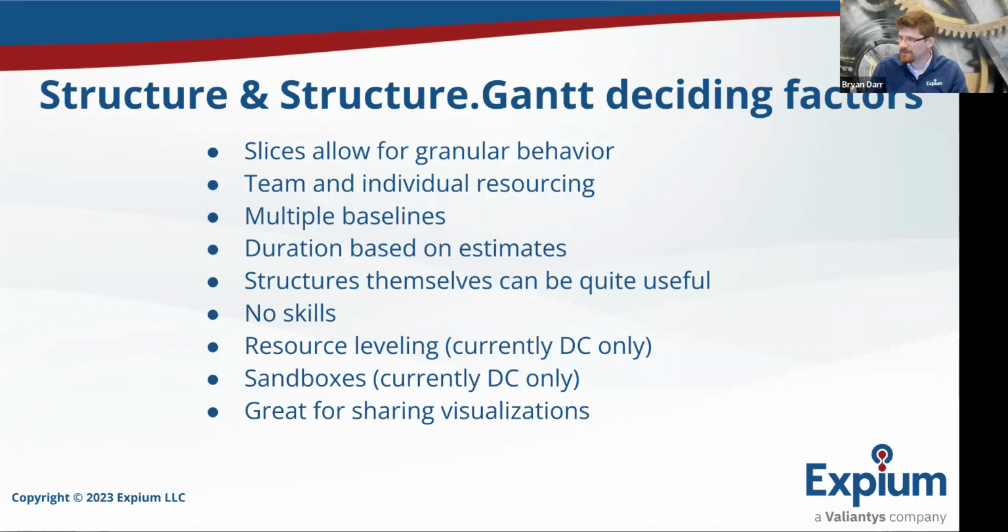Let me check the Q&A in chat really quick. Q&A. What's the benefit of multiple baselines? Is that lined up with best worst case scenarios? I think that multiple baselines is helpful if you want to track throughout the project. Maybe you have an adjustment midway. So you do your initial baseline and then everything changes. So you do your next baseline and you can just mark, as it changes over time. I agree though, you might just want an initial baseline and be done.